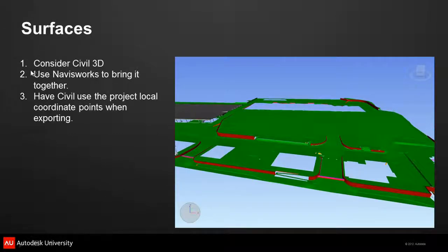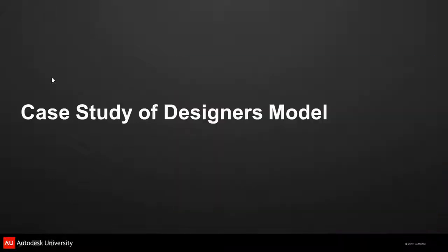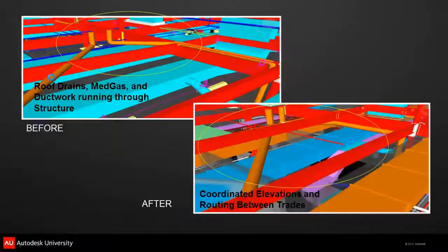Bringing in the surfaces is very helpful in looking at where overflow drains are going to come out of the building and how those are going to tie together. We use Navisworks typically for this, bringing in the Civil 3D part. It's kind of clunky to bring the civil infrastructure and utilities into Revit to do utility coordination with plumbing. So that's where Navis within our firm comes in. We've talked about this one.